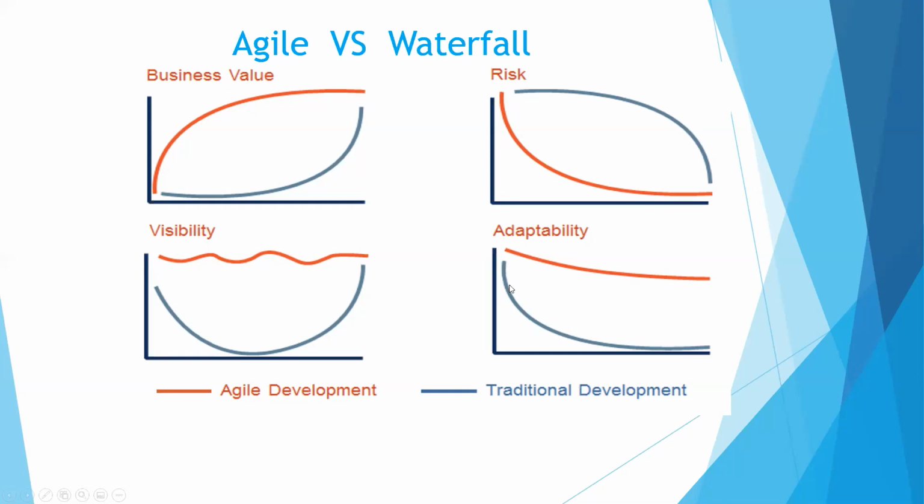But in Waterfall, because you spend a lot of time and a lot of money planning at the beginning, following the S-curve, the cost of change is very, very expensive. That is why you have a change board that consists of senior people in traditional project management. Before every change control, every project governance, every PMO, before you get money for approval, you have to do a lot of documentation and go to a lot of meetings before you can actually change anything. And the schedule and risk analysis of that change needs to be analyzed on time and cost. So adaptability in Waterfall is very, very low.